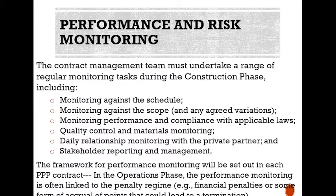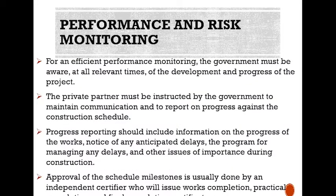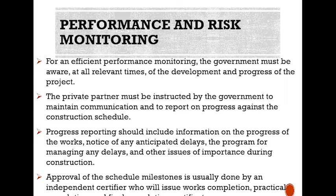The framework for performance monitoring will be set out in each PPP contract. In the operations phase, the performance monitoring is often linked to the penalty regime — for example, financial penalties or some form of accrual of points that could lead to a termination. For efficient performance monitoring, the government must be aware at all relevant times of the development and progress of the project. The private partner must be instructed to maintain communication and to report on progress against the construction schedule. Progress reporting should include information on the progress of works, notice of any anticipated delays, the program for managing any delays, and other issues of importance during construction. Approval of scheduled milestones is usually done by an independent certifier who will issue work completion, practical completion, and final completion certificates.